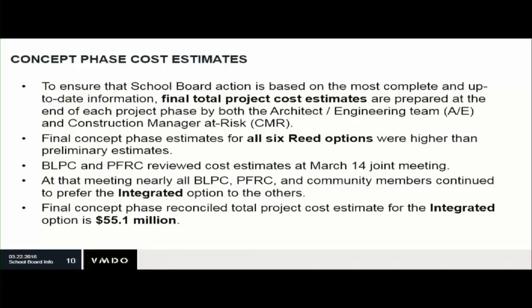Okay. So on slide 10, and I think this is what you were saying in the last bullet, the reconciled total cost for the concept phase is $55.1 million. But that's been an increase of $6 million from what the charge was, from what the cap was. And that's just at concept design phase.